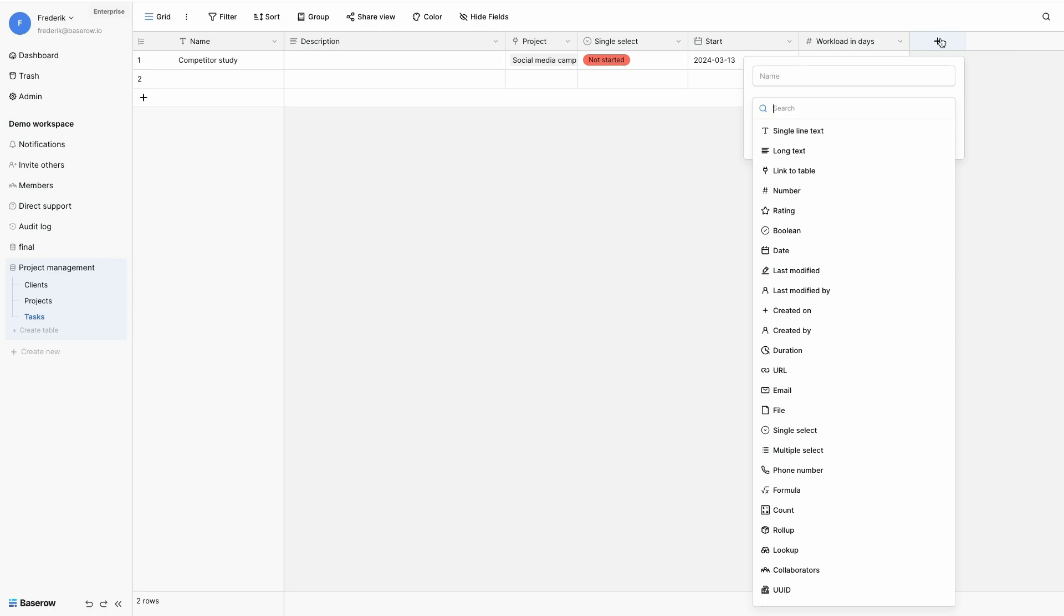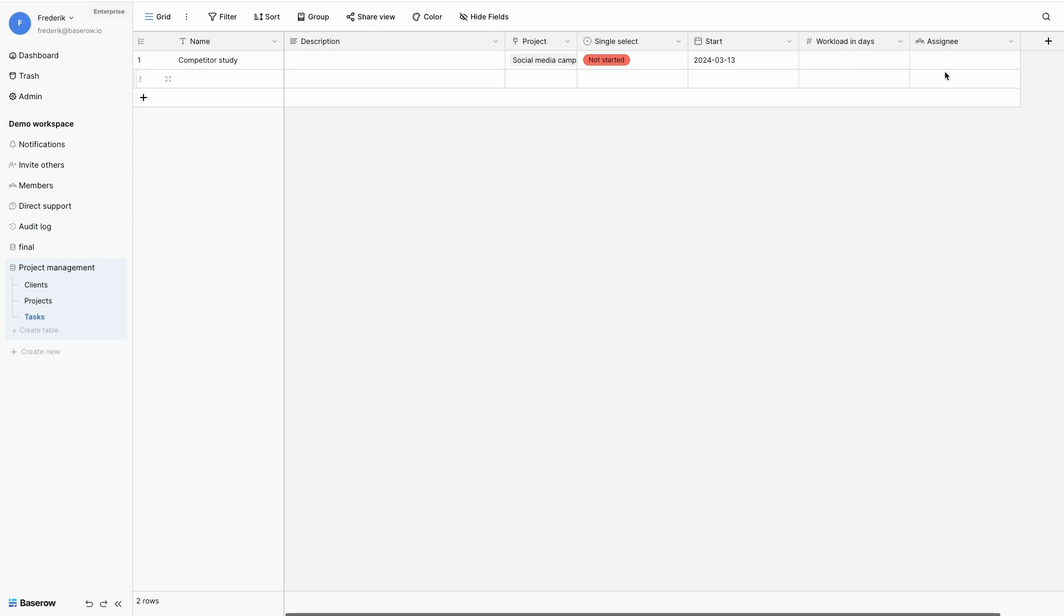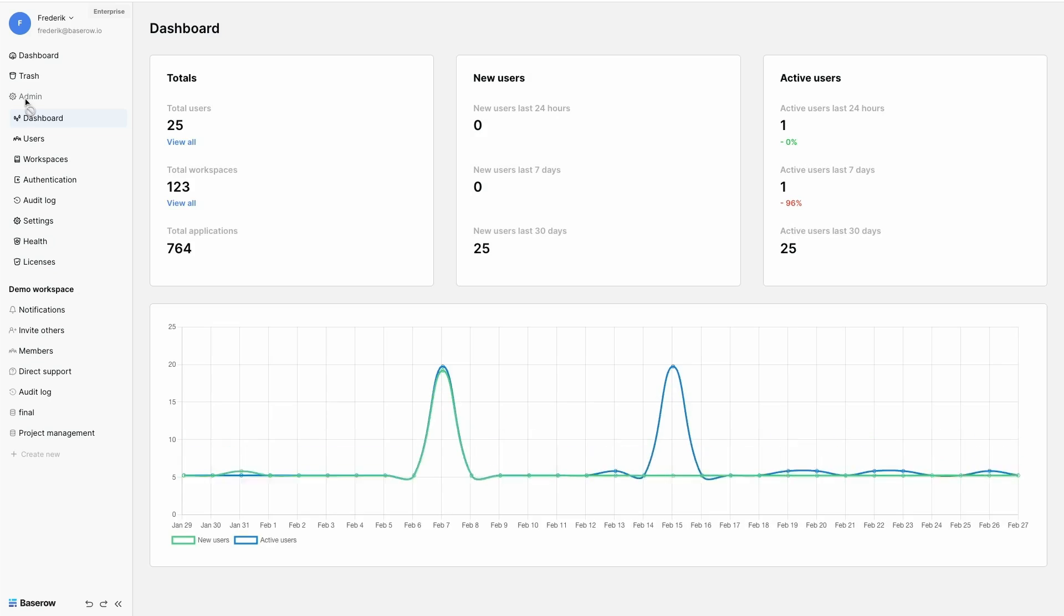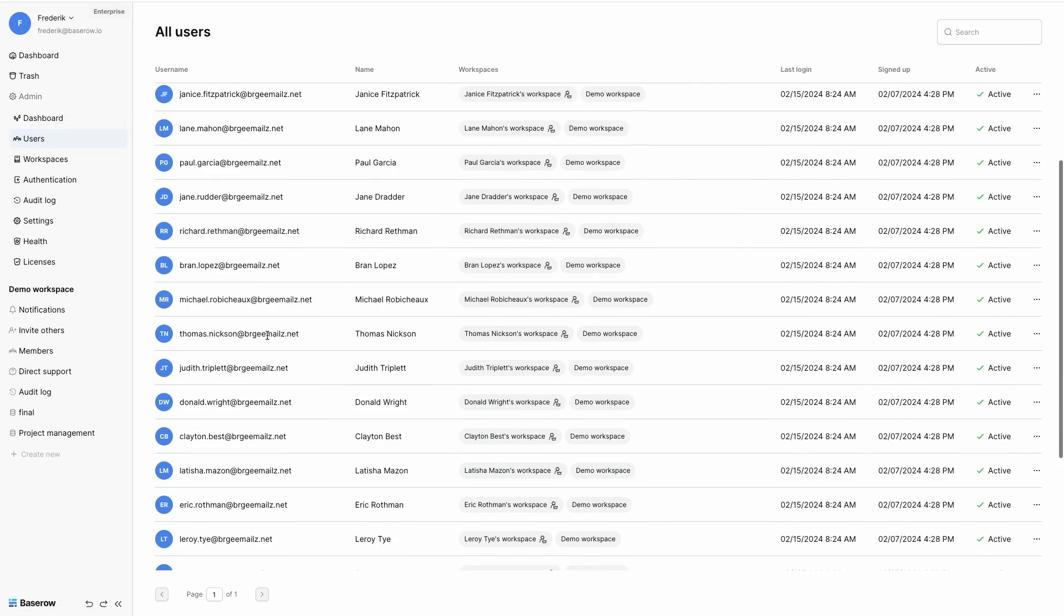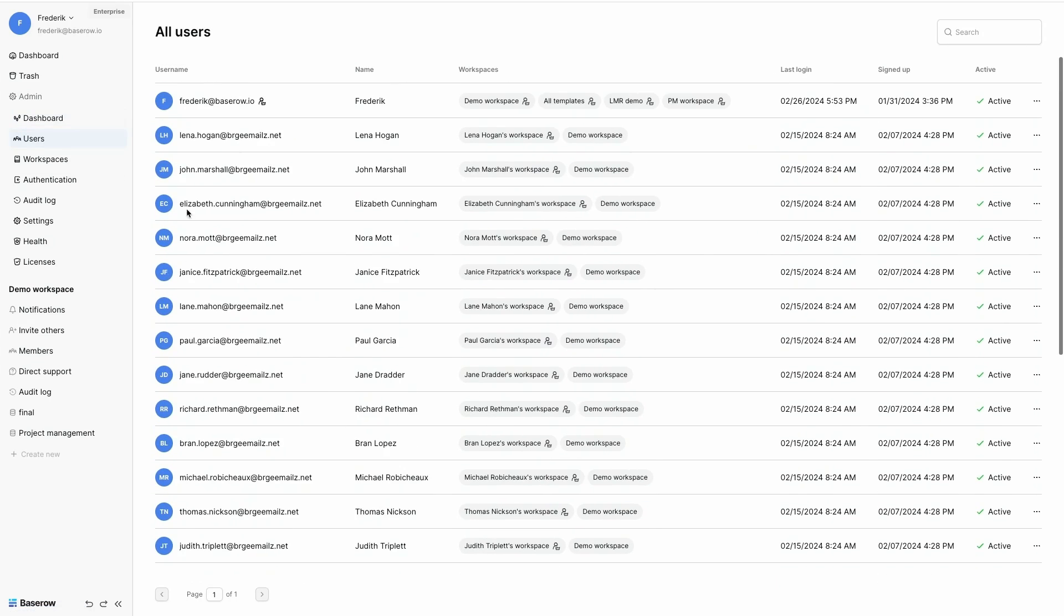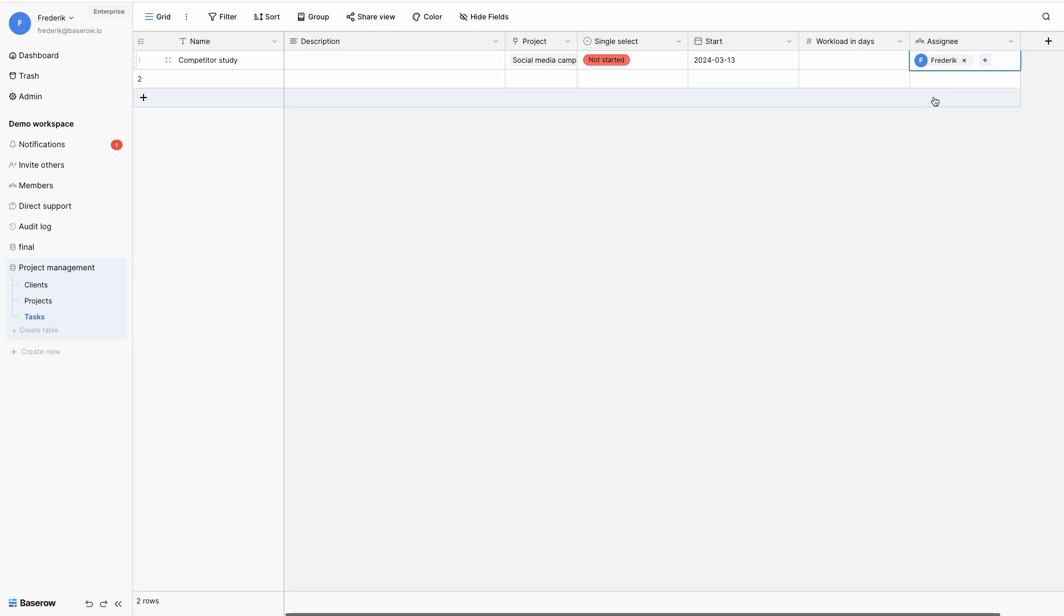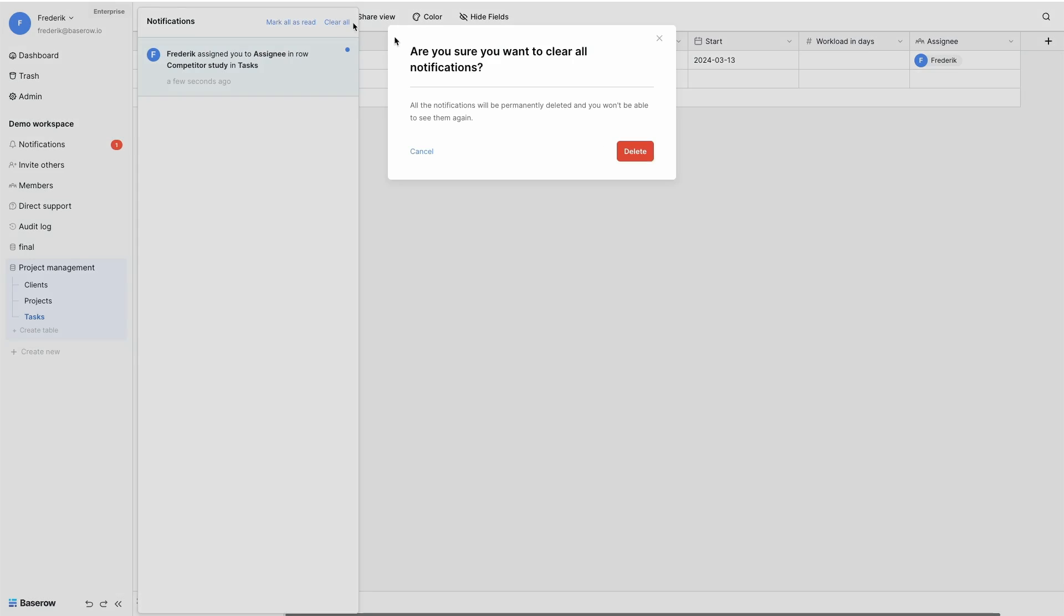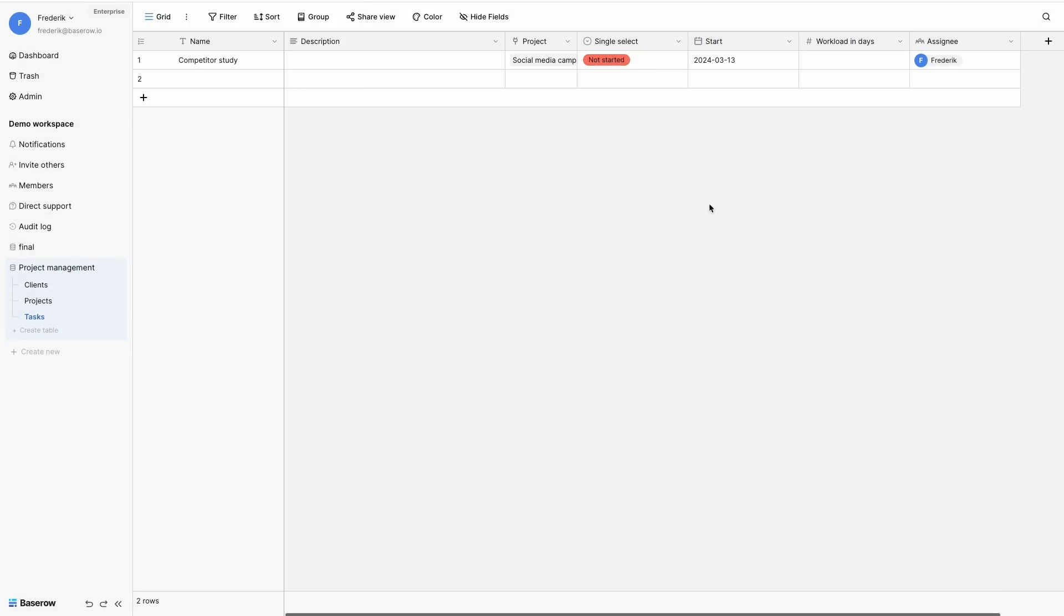And I also will create a collaborators field. So tasks need to be assigned by someone. And the collaborators field holds all the users of your Baserow instance and the members of the database. You can check this in the admin panel if you have admin rights. And each of those members can be assigned to a certain task. They immediately get a notification in their dashboard and also an email when a task is assigned to them.